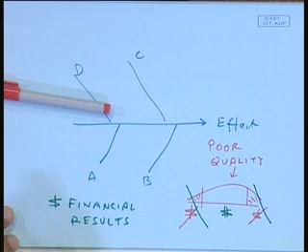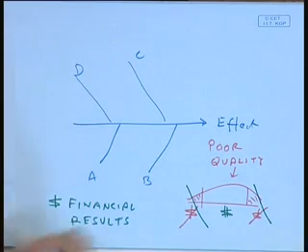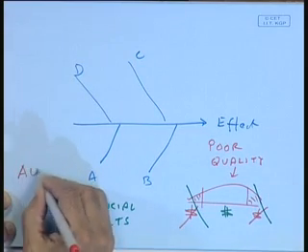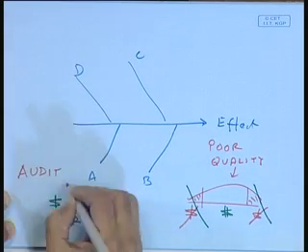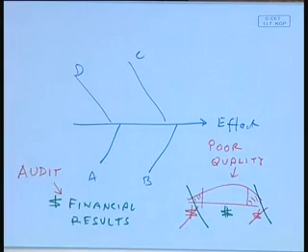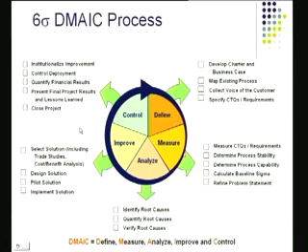And this might require an audit. So you do an audit to find out, has this actually happened? Do the audit to confirm that the results have actually been achieved and you're saving money or you're making money because of additional profit. That is something that will have to be done. Present the final project results to the stakeholders, and of course you close down the project, you release the resources, and perhaps there is another Six Sigma project waiting for you to take over.